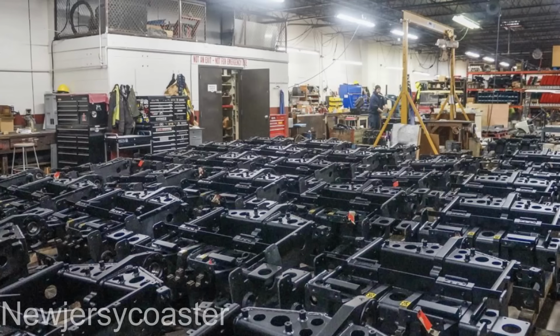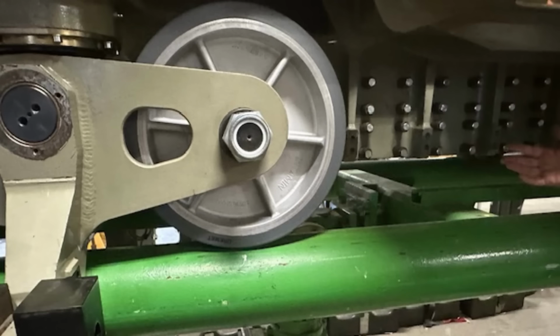And you can approach this more step driven, 1, 2, 3, 4, 5, and say, well, we can take off this coach or this train and refurbish it and put it back on the track and then take off the next train. And you could focus your manpower and effort on one particular thing to get it done as fast as possible. That's a good theory. The only problem is a lot of times by the time you get to that second train, it's deeper into the winter time. It's colder, there's more ice out on things, the conditions are more dangerous to move these things around in, so you just don't want your workers outside in that environment unless they absolutely have to.